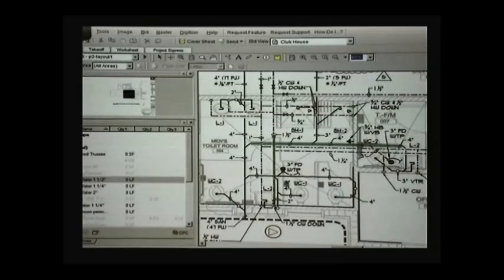Normally, if you're doing an estimate where you just want to get an idea of the price, you won't do this. You will do just a quick linear estimate. Take an average price and calculate the cost of all your piping at once. Add a contingency value, and you're done.